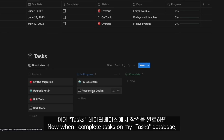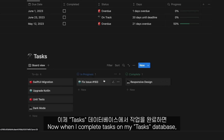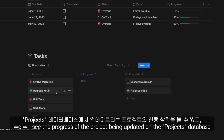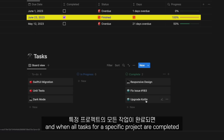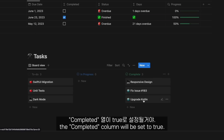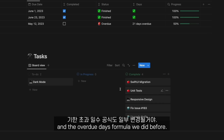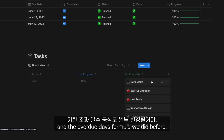And we are done. Now, when I complete tasks on my tasks database, we will see the progress of the project being updated on the project's database. And when all tasks for a specific project are completed, the completed column will be set to true, which will also trigger some changes on the status and the overdue days formula we did before.